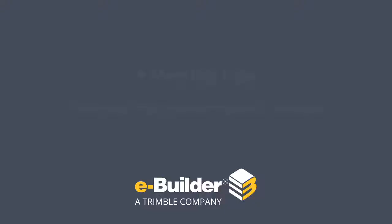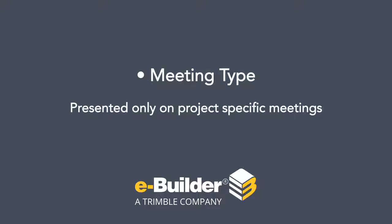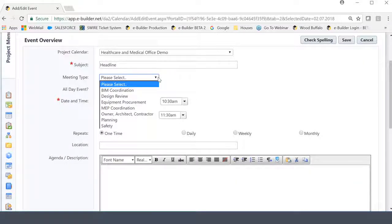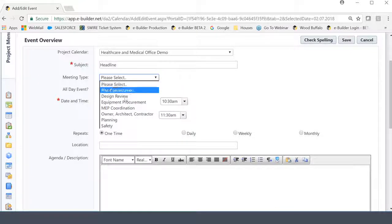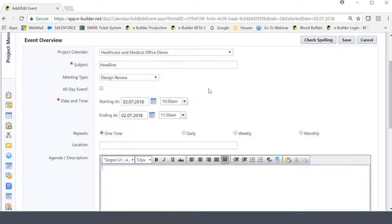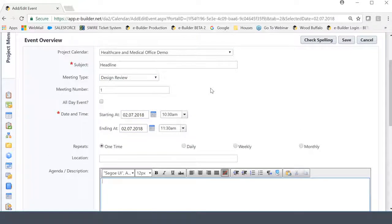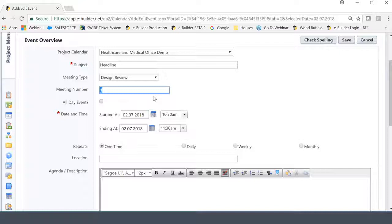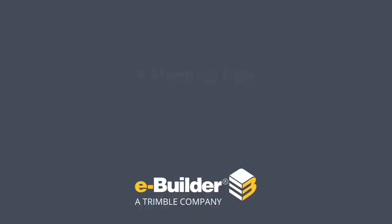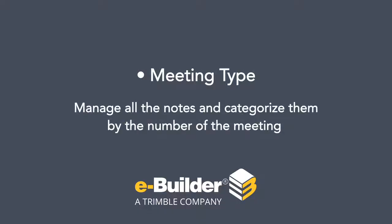And then we're in unfamiliar territory once again, which is the meeting type. So the meeting type is presented only on project-specific meetings, because, again, this is where you are recording actual notes as you gather and you want to record and report on. So what you're doing with meeting type is you're basically categorizing the meeting. Now, the value with this is that as you categorize the meeting, and let's hypothetically say I choose design review, what the system will do is it will automatically number that meeting type. Now, not a big deal, right? Number one, the first design review meeting for this specific project. However, if let's say we have multiple design review meetings, which I know most projects do, the system will allow you to do is manage all the notes and categorize them by the number of the meeting they were in.